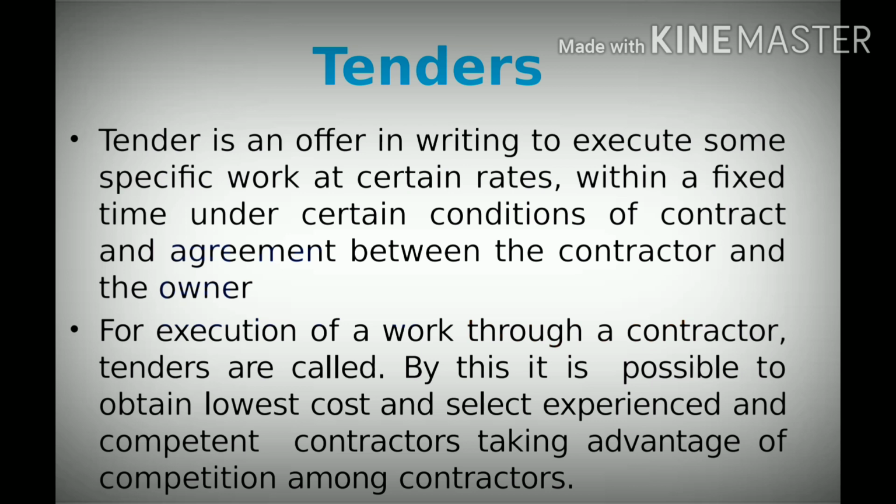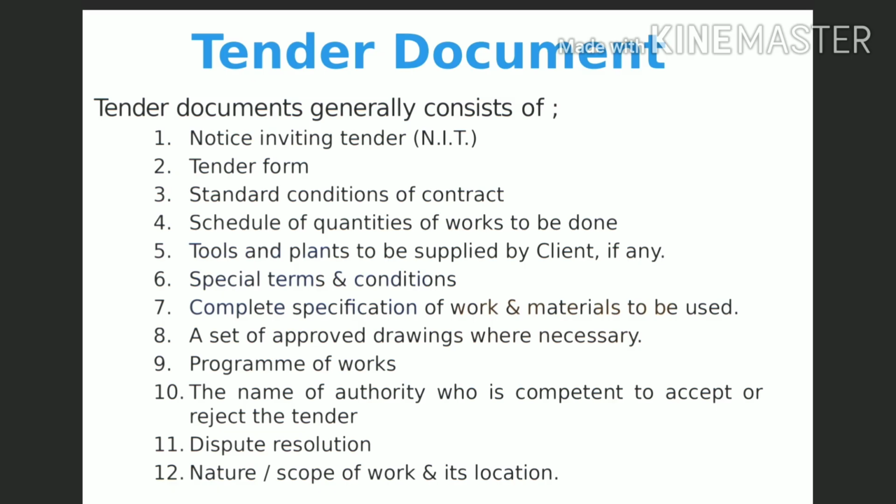As we all know, a tender is published in the form of tender notice in newspapers, notice boards, or websites according to the cost of works. Basically, the difference between a tender and a contract is that a tender formally means an invitation to trade under the terms of offer, and a contract is the term used when the parties have reached an agreement.